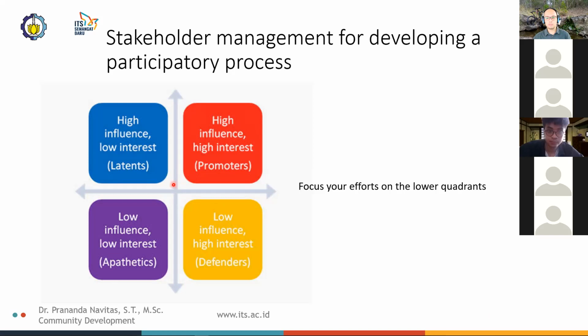Here, the largest amount of attention may go to the people in the 2 lower quadrants, since those with little power often have less experience in such areas as meeting and planning, and they have less confidence in their ability to engage in them. They'll definitely need information about what they're being invited to do, and they might need training, mentoring, and other support measures in doing it.